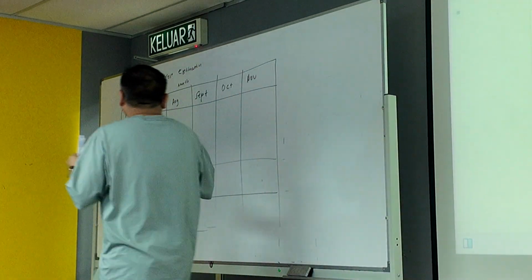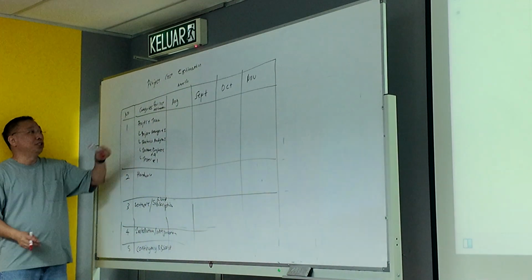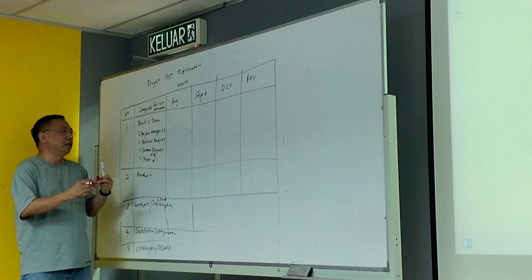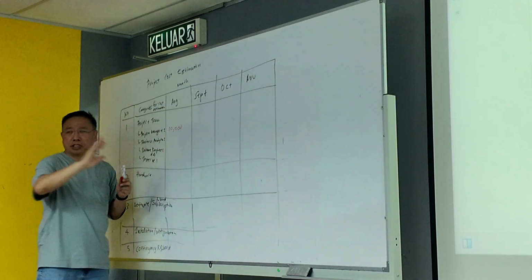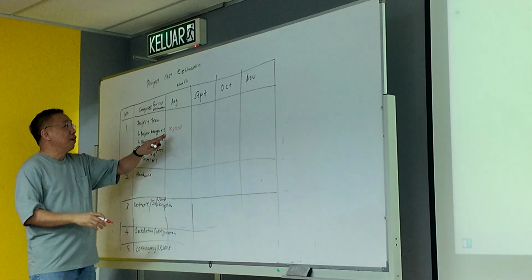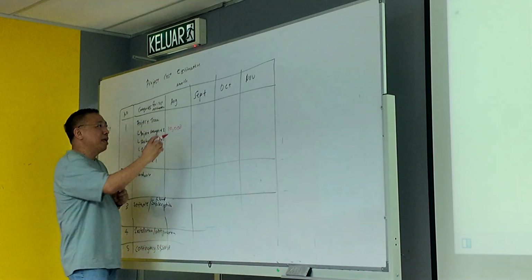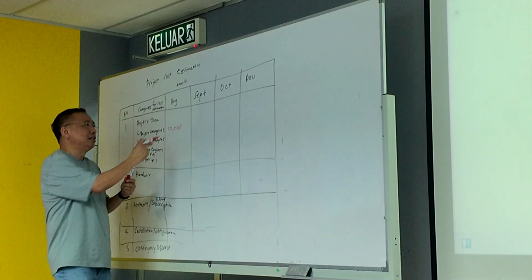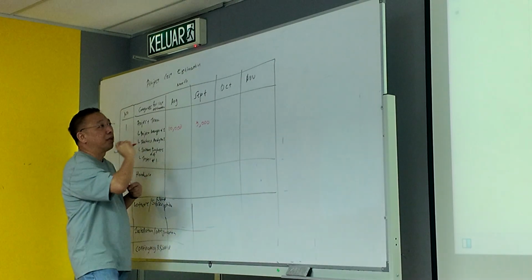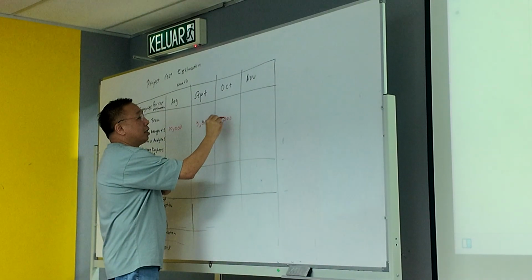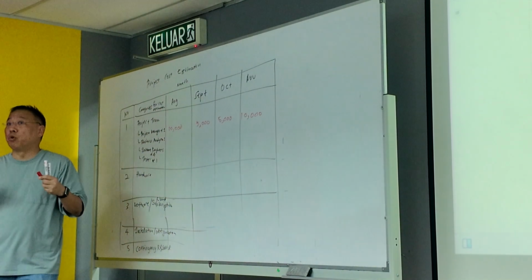Okay. So then what will you do? You start filling in numbers in the months. Okay. So project manager, yeah, I need the project manager. So maybe it's about $10,000 a month on the project manager, let's say you budget. First month, I definitely need the project manager full time there, so I'll budget this. September, because the project starts running already, he just needs to come in for progress meetings and things like that. So I need half of his time, so maybe I budget 5,000. October, I budget 5,000.